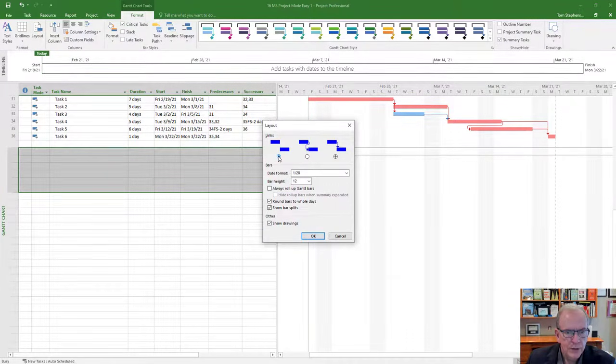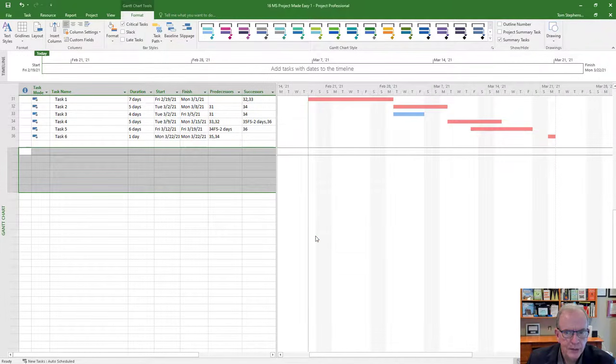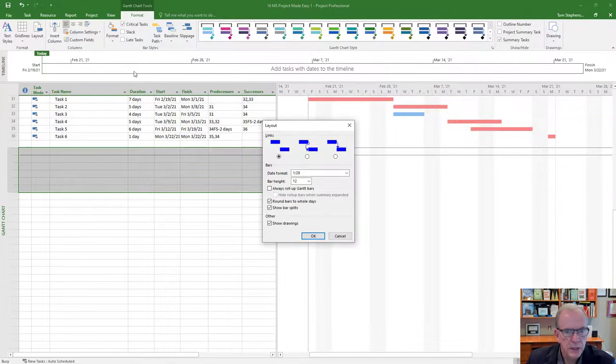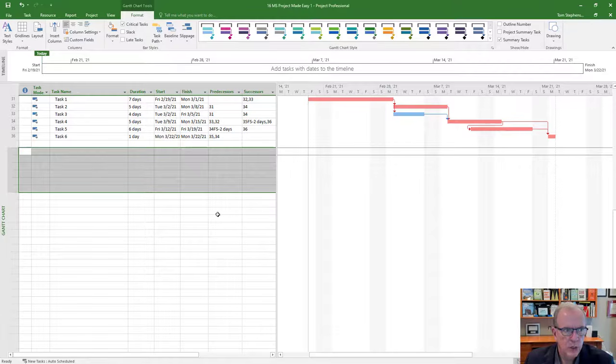A lot of construction contractors might want that if they don't want the client to see where the critical path is, so they turn it off, and then you don't know where the relationships are. That wouldn't be what I would do. I am very into communicating things accurately, so that wouldn't be my advice. You have this relationship link here. We click it back on and then they're back in. So you can always turn things on and off. That's another thing to keep in mind.